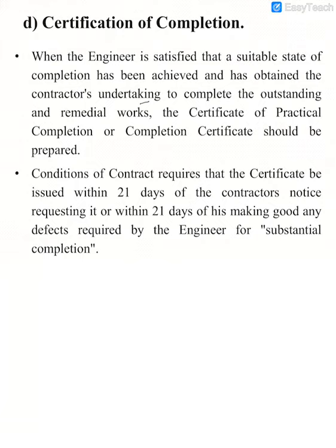Okay, and then the last one, the condition of the contract requires the certificate to be issued within 21 days to the contractor, once they get the notice or request from the contractor, or within 21 days of his making good any defect required by the engineer for substantial completion.